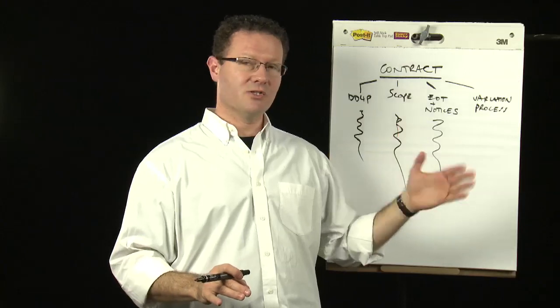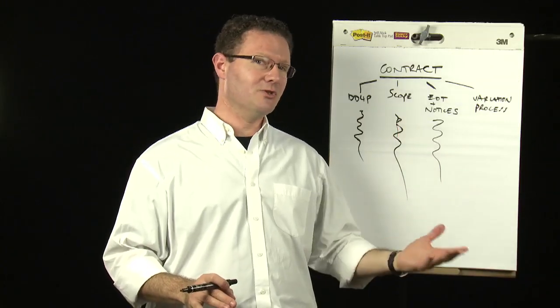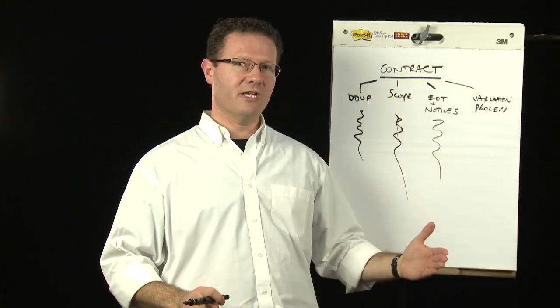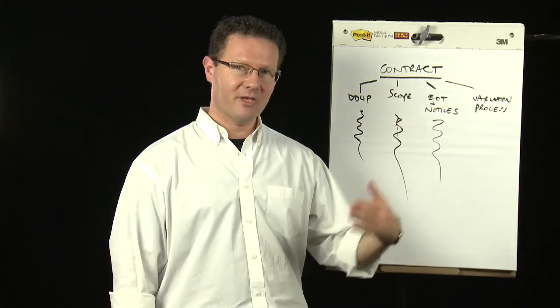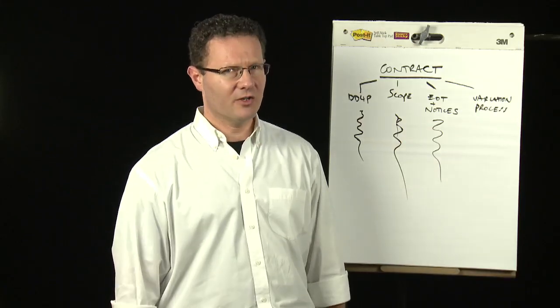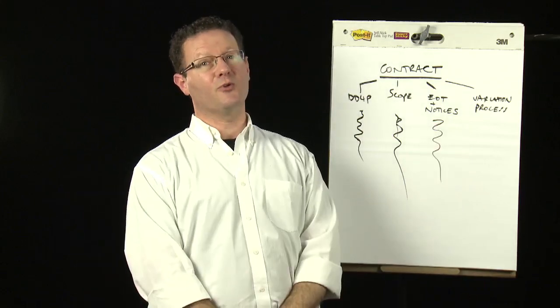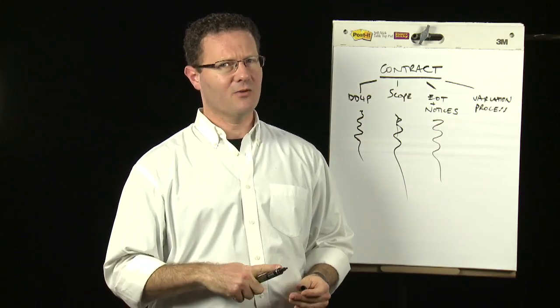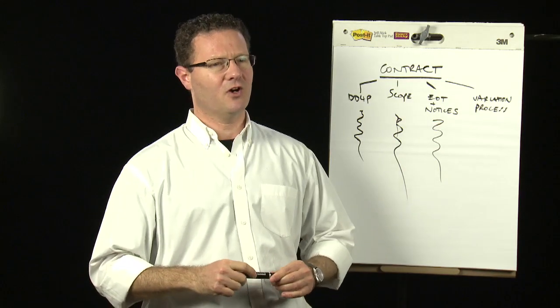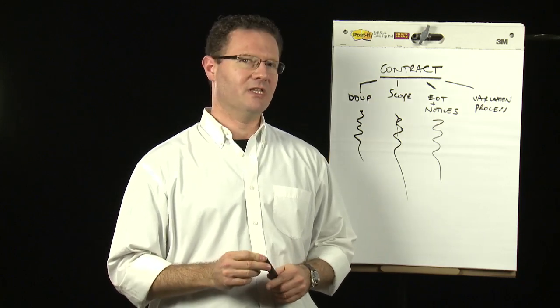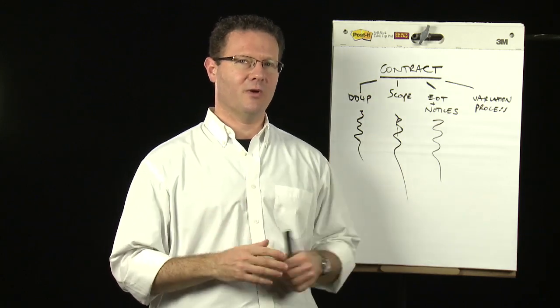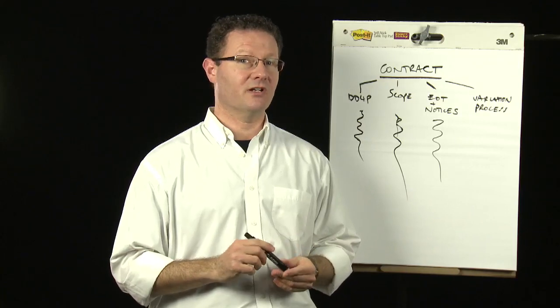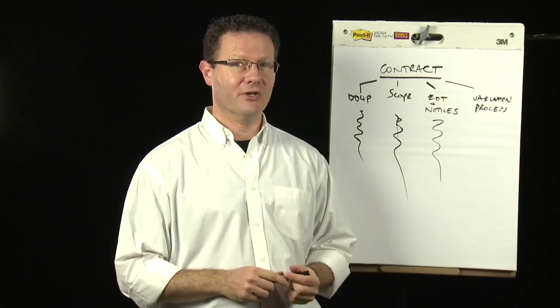So now your client's wandering off again away from the contract and you need to be going, hey, this is your contract. I signed and you signed. It says you need to do X, Y, Z. So please perform that. You need a quote from me. Here's my quote. Needs to be signed off or approved in writing. I'm waiting for your written approval. Clients will say, don't waste time. You're holding it up. I haven't got time. To which the answer is, I'm not wasting time. Here's my quote. You're wasting time because you're refusing to sign it. As soon as you sign it, we can do the work.